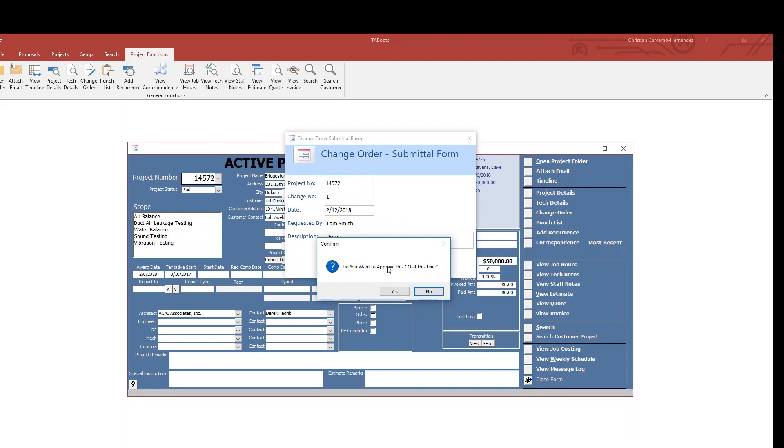Do you want to approve this change order? Well, unless you have a PO in hand or a check in hand, you always want to click no.